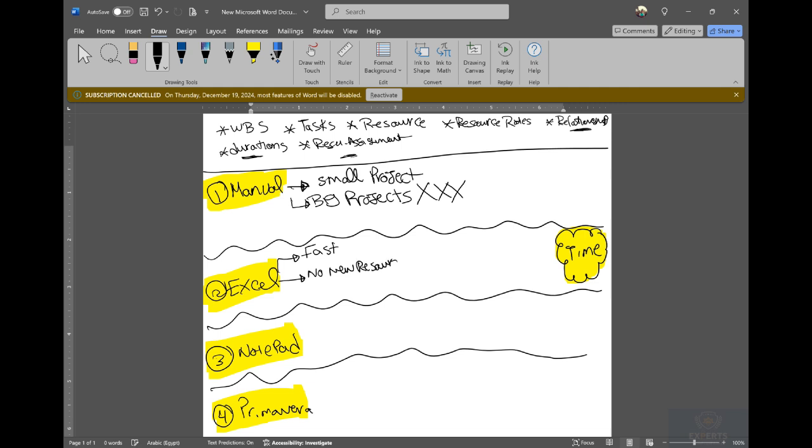Maybe some people know the way, but I don't know the way, okay, because they are using some SDK and some programming tools or something. And no new WBS. So the problem of this one is that no new resource can be defined and no new WBS, okay, but it's fast. So if you decide to use Excel for entering or updating data, I prefer that you define the resources and make the new WBS and assignments first, okay.